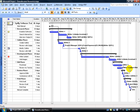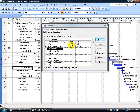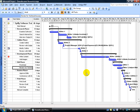So for over-allocation, aside from the administrative assistant who's not available until October, you can see the editor is working on both tasks — 8 hours here, 8 hours there. You can come over here, select the task, and click Assign Resources. The editor is at 100% on one task, and also at 100% on the next. His resource calendar wasn't modified, so his 100% is a full 8 hours. Let me close out and go to that first screen.